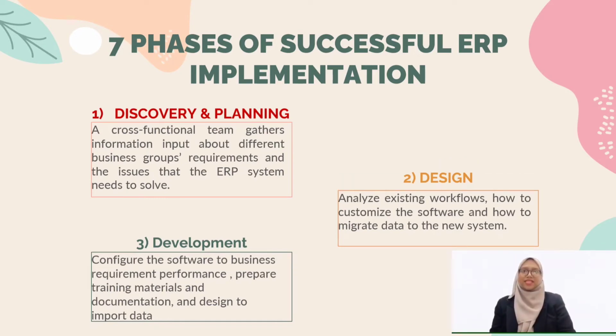The second phase is the design phase. Analyze existing workflows, how to customize the software, and how to migrate data to the new system. The design phase works from detailed requirements and an understanding of current workflows to develop a detailed design for the new ERP system. This includes designing new, more efficient workflows and other business processes that take advantage of the system. It's important to involve users in the design phase since they have the most intimate understanding of current business processes.